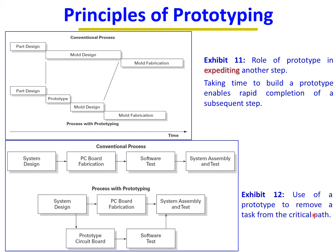Exhibit 12 shows the use of a prototype to remove a task from the critical path. Conventionally: system design → PC board fabrication → software test → system assembly and test. With prototyping: system design → PC board fabrication → system assembly and test, while a prototype circuit board enables software testing in parallel. You bypass waiting for PC board fabrication to do software testing.